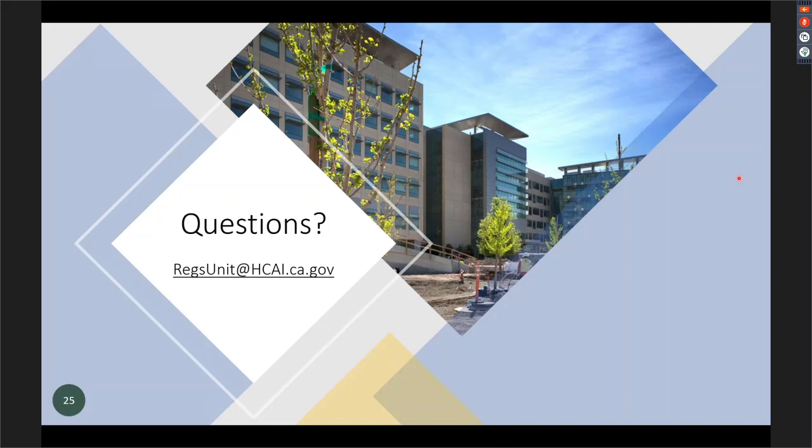You know, what piece of equipment is this? There's a box, it's empty, there's no tag on it. The piece of equipment's detailed for anchorage or something, and you're just putting the label on it. No change to the design. You're physically changing the drawing, but there's no change to the design. You're just clarifying information that might have been obscure or missing.